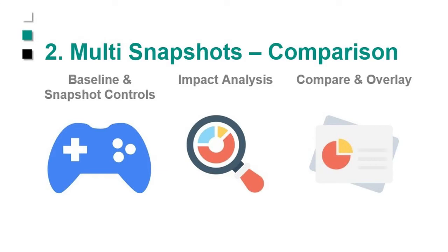Now, when we snapshot, we can grab baselines as well. So this gives you maybe weekly snapshots. So you can do an impact analysis. You can compare time over time data. These are all things that are not that achievable, if even achievable, using Excel pulls, okay? So this brings your capability of reporting up considerably, because now you're not only looking just at what's going on right now, you can do comparisons. So that's a big thing in what a data warehouse approach brings to the table.